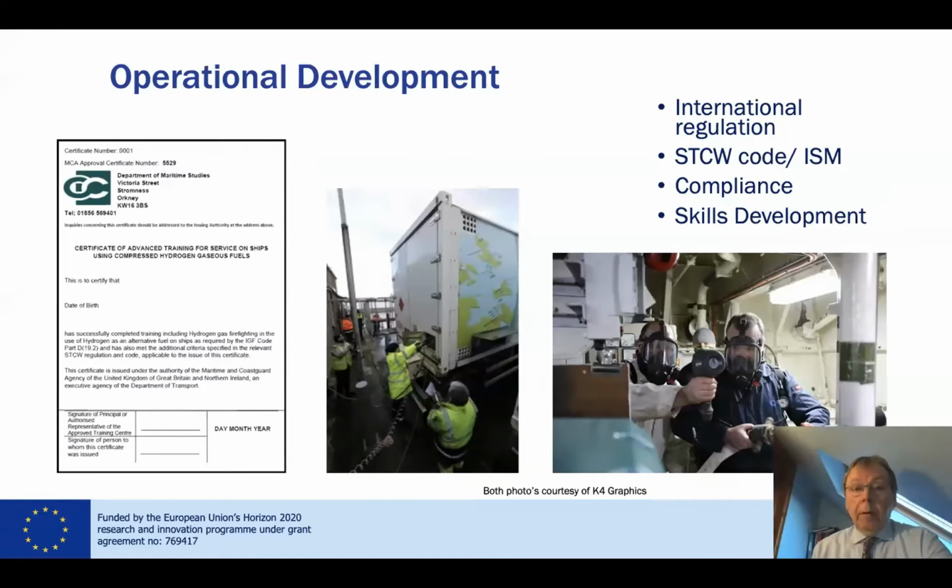Yes, it was noted early on in Project HyDime that the correct skill set was not available for marine crew to operate on hydrogen vessels. So we had to engage with our Maritime Coast Guard agency to see if we could get the correct skills training brought up to speed and get accreditation for that. As we know, shipping is governed by the IMO and international regulation. We must provide crew to the STCW code and meet our operations manual through the ISM code. So quite a lot of compliance to get through on this.